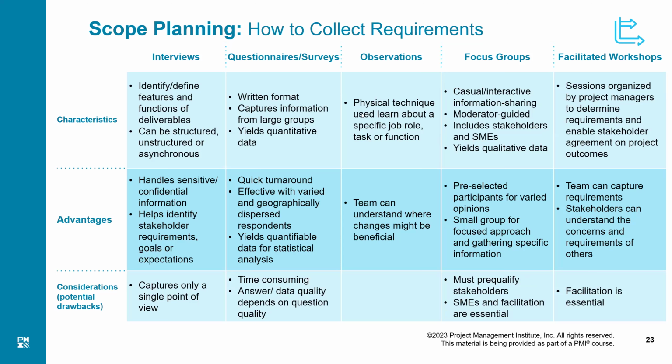In a questionnaire, we want to have closed questions, like, are you agree or disagree with something, right? Or select the options given here. You give them 5 options, 3 options, and they have to select out of them. This is quantitative data. This is good for a very large group, and it will consolidate the data results statistically.